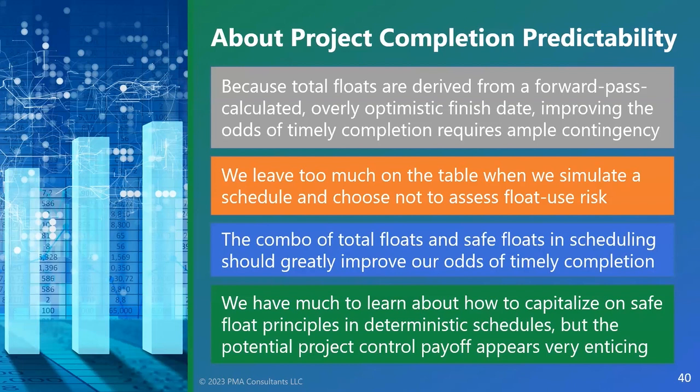So next question, does this stochastic approach always generate results that model a normal distribution? That's from Gerald Rosario. I can take that one. So not necessarily. Consider cases where you might have certain risk impacts which end up creating bimodal distributions for completion dates for projects.